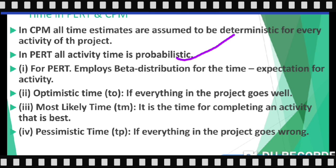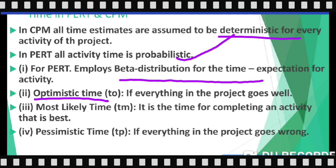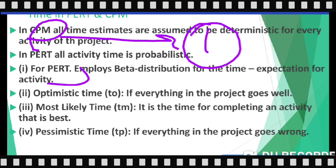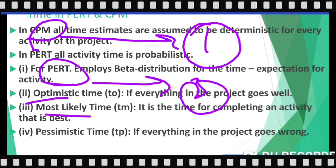In CPM, time estimates are deterministic, while in PERT all activity time is probabilistic. PERT employs beta distribution for time expectation for activities and has three time estimates: optimistic time, most likely time, and pessimistic time. In CPM we have only one time estimate, but for PERT we have these three time estimates.